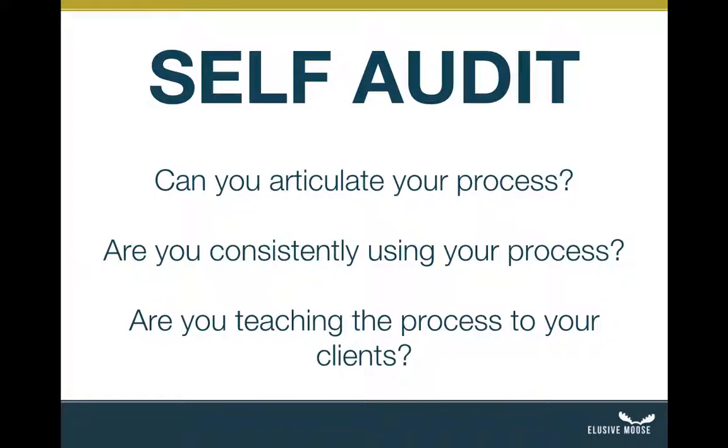What I found the Agile thing does is it removes that question, because the idea of a defined scope and a number and a rigidity in the definition of a project, and then measuring the success of whether or not you hit that goal, is addressed in this method of saying, okay, we're going to set a number because I've got X number of dollars to spend on this, and now I'm going to negotiate with you along the way to make sure that if the number is super important and it's hard, then we're not going to exceed that, but I'm going to negotiate the features along the way with you.